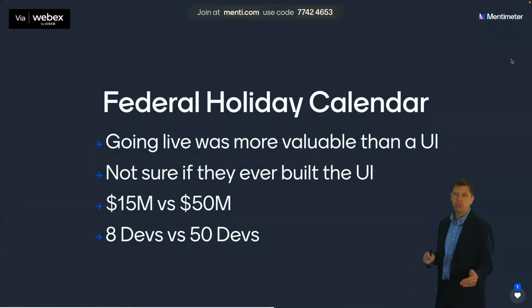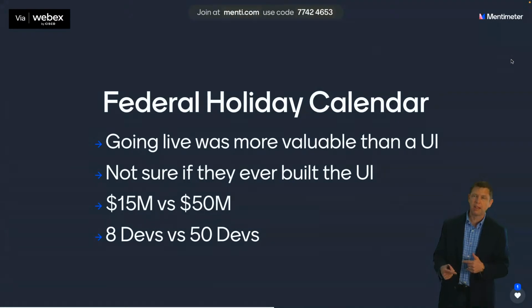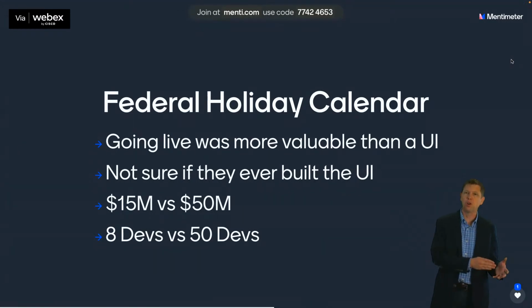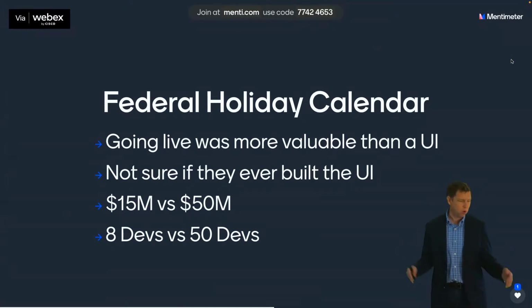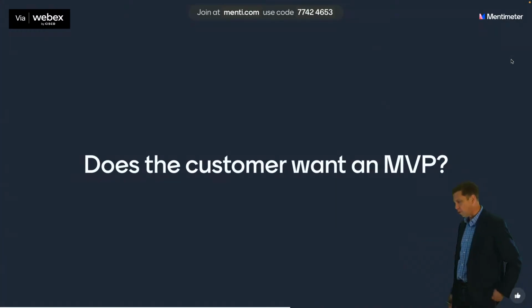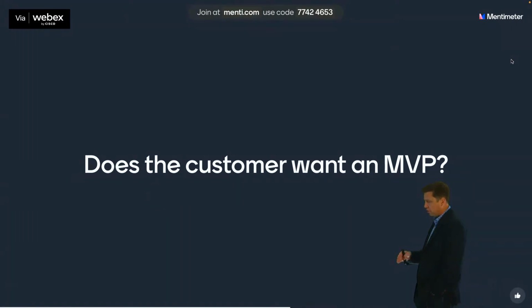If we had just built it at the very beginning, they wouldn't have had the option to go live without it. You can't ever take software that you created and exchange it for moving your go live date on the calendar just because you want a different date. The only way to do it is to push it out, to delay working on those things. And that's what MVP helps you do.